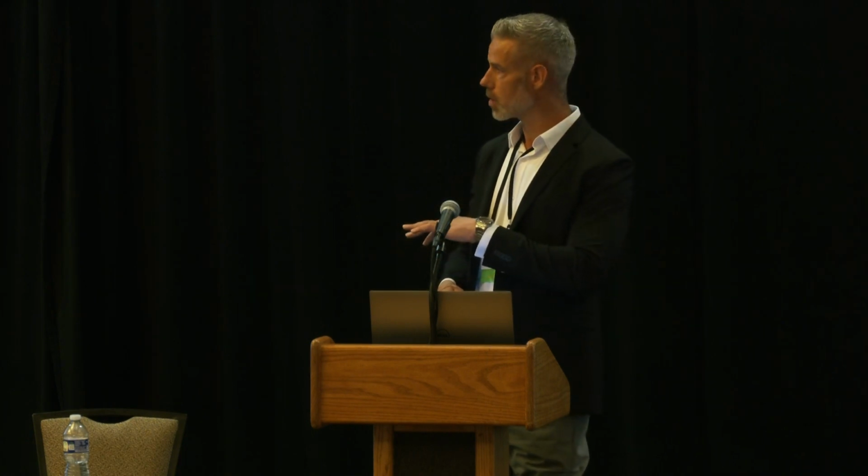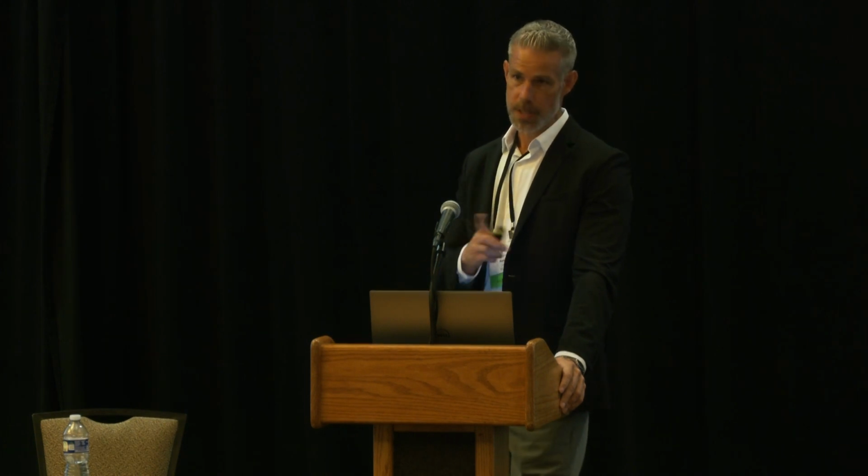So this project at one point, I believe, was one big contract, and then it got broken up at some point. But basically, this is the main project that I'm covering today, which was done through CMGC. But there were also, as part of that, 3 advanced contracts that were your typical design-bid-build that were completed just prior to mainline starting. And those were all 3 separate contractors that did those. And again, it was the CMGC contracting method, and that included 3 early work packages that I'll cover shortly. All projects together were well over $200 million.